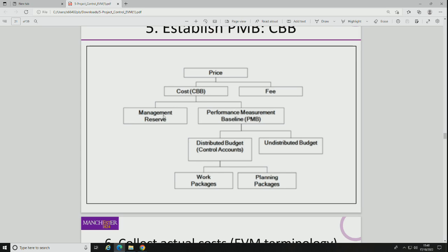But what's this here, management reserve? Now that's a new thing, indeed. So the management reserve is something for unanticipated work which is still in scope, is its definition. But essentially, it's a pot of money which has been allocated, and it will be based on historical amounts of management reserve required in the past, perhaps in other things, there'll be a basis of that allocation. But it's basically there for when things we can't anticipate happen. Unknown unknowns, things we don't know.